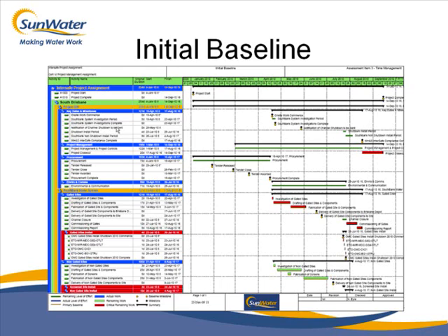If this is your schedule, and you're like, okay, we need some more activities. We found out that this new bit is required. So you go back in here and you put it in there. You submit to your board, saying, look, we need more money. We need approval to make the project go longer because of this, and this. So then they compare it to this original baseline, and they see where it is, and they make the assessment. Oh, okay, this is legitimate, or no, you've got to find some way of getting it to that date.